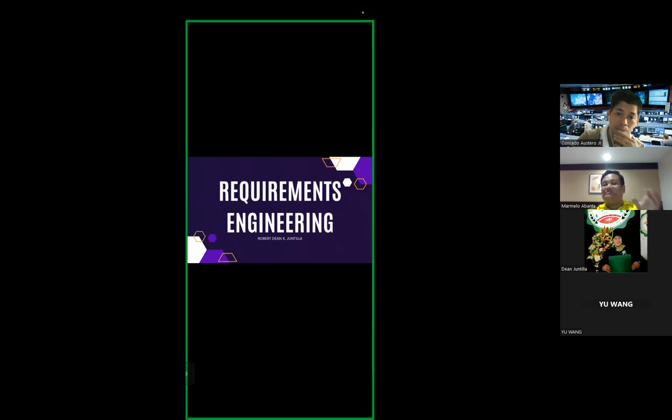Once a contract has been awarded, the contractor must write a system definition for the client in more detail so that the client understands and can validate what the software will do. Both of these documents may be called the requirements documents for the system.